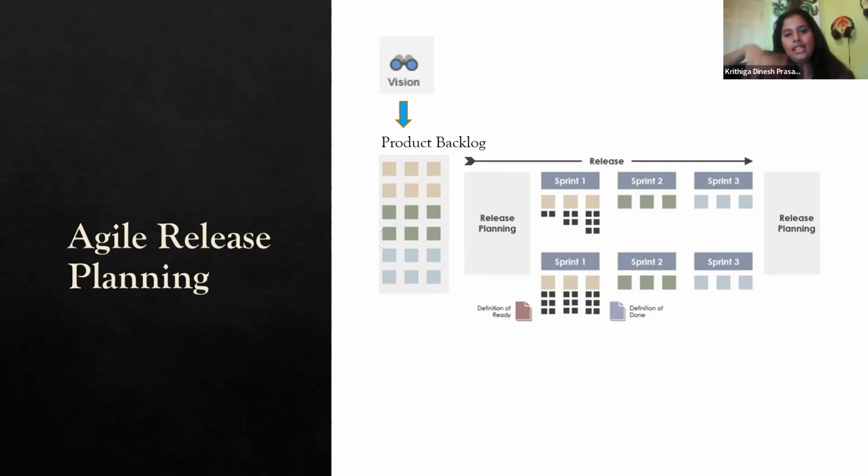And then assigning, okay, out of these system requirements, what all falls under mechanical, electrical, software; some requirements could be both, so that kind of alignment will be obtained. And then we will have discussions with the customer, since agile also focuses on customer interaction. We would discuss with the customer to understand what their expectation is. We receive the system requirements, and then in the agile world we can call it a scrum of scrums with the system team and other teams to understand what is needed for the software team.